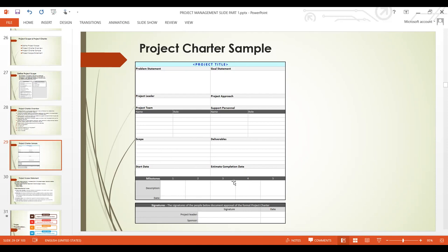our work breakdown structure we'll be using as our framework within our project life cycle. We have 4 stages, like initiate stage, then we have define stage, and we have execute stage, and we have closure stage. So each of these stages, like define stage, must have a milestone, so that at the end of the define stage, when you get to this point, you know, yes, this is a milestone. For instance, you can say that in the define stage, once you draft your business case and get it validated, it's a milestone. So this is how you create your milestone.